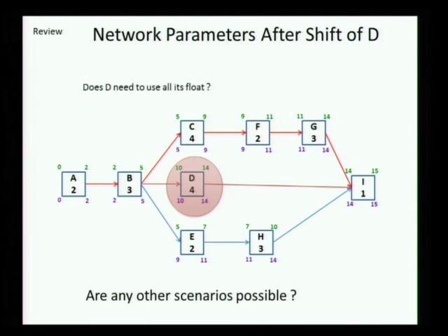So you will say that look, I fixed this person to start on the early start date, and there is no way I am going to change my schedule on him, whereas E and H are subcontract types of work in which more kinds of people are available to do, or the subcontractor is flexible on that. So there are many constraints that come into finally deciding which activity to move, but the important thing here is to realize there are multiple options.